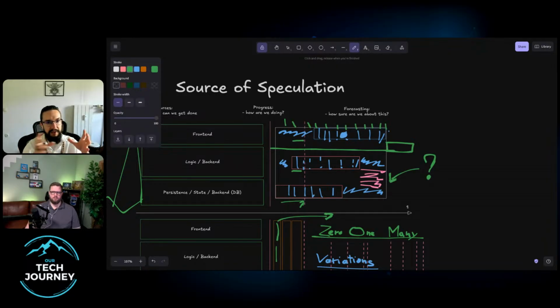Most companies have like a second pair of eyes policy somewhere along the path to production. So even if you think that, oh no, it's simple, I can do it alone, it's probably just a few hours of work, I would already be including the person who's either going to be doing the handoff, testing, review. Maybe your mentor needs to do a second pass on it. Maybe you have a gatekeeper who is doing deployment to production or full canary release. That's definitely something to watch out for.